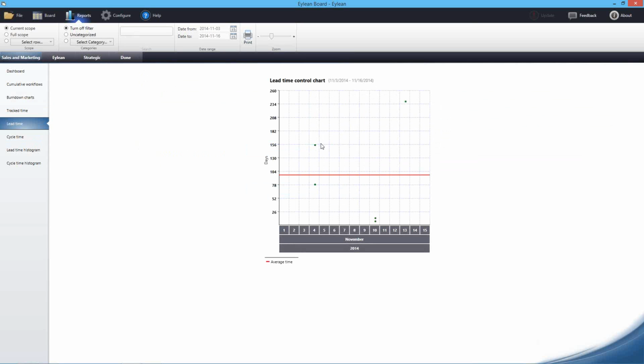And this shows us problems where some items might lie a little bit in the planning phase and they aren't getting anywhere. And this shows us that there are scope creeps, that there are dead items which need to be groomed, and this always encourages the team to keep the backlog clean and to work on items that are really important and the most important.